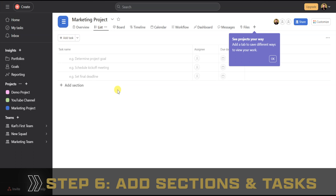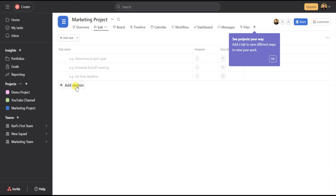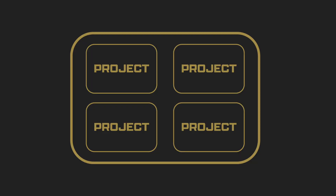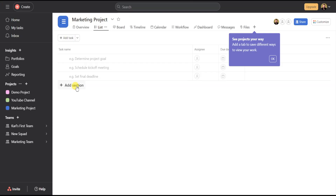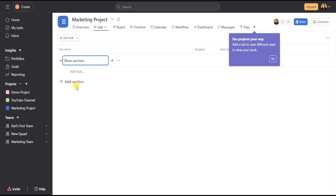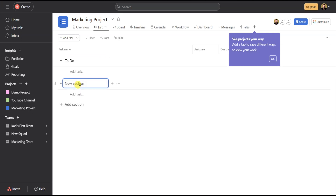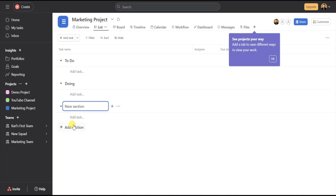Now in Asana, we have to add sections and add tasks. Sections go within projects — you're going to want to think of sections as parts of the project or stages of your workflow. To keep it simple, we'll build a basic workflow. Click on Add Section and type 'To Do,' then click Add Section again and type 'Doing,' then click Add Section one more time and type 'Done.'